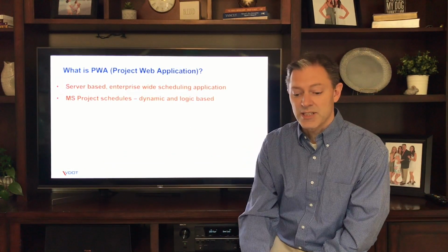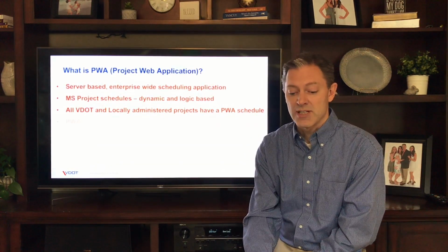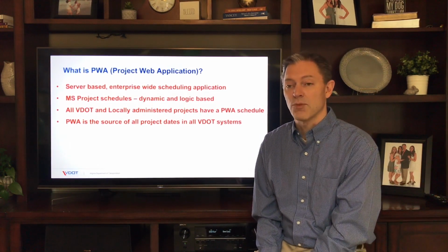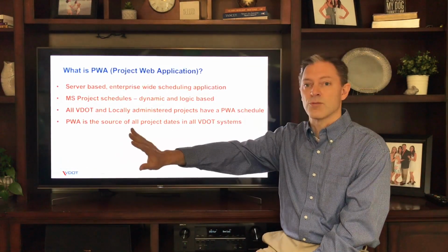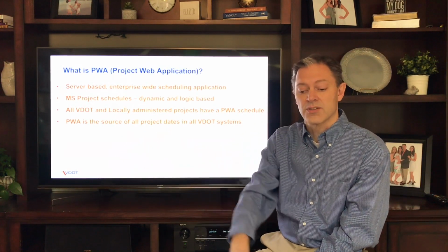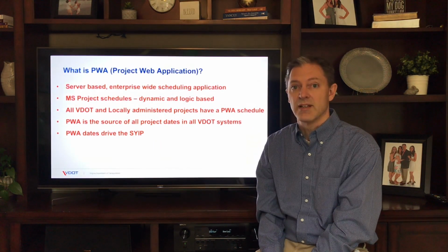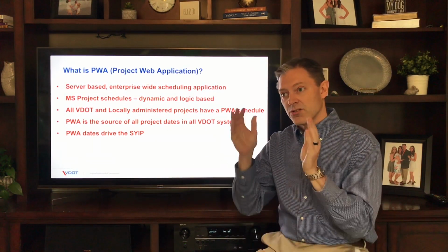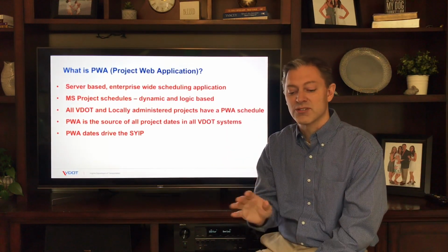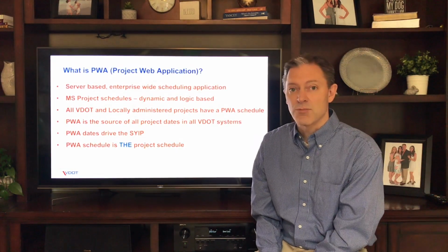It is dynamic and logic-based schedules. All VDOT and locally administered projects have a PWA schedule. PWA is the source of all project dates within VDOT, and what I mean by that is all the downstream consumers of this data, including dashboard, all those dates for schedules come from PWA. PWA also drives the Six-Year Improvement Plan. Those dates, again, make sure the right money is in the right place at the right time. All those schedule dates come from PWA, which makes PWA schedules the project schedule.